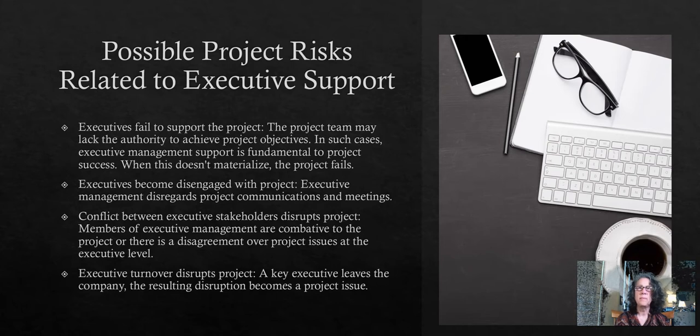But now, regarding our example project, the third and fourth one in this group, I hope that you can see how those risks were relevant for this project. Since the CIO was new and was seen as an outsider from the day they joined the organization, that was evidence that there already were some conflicts between that person and the existing stakeholders.